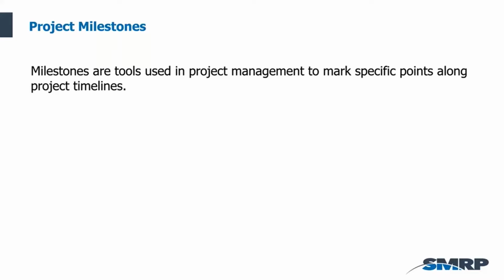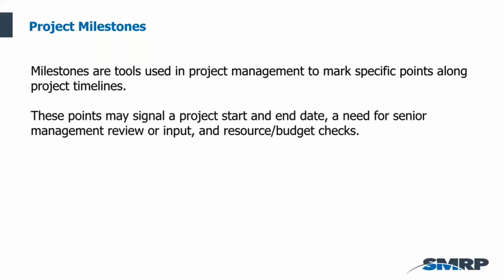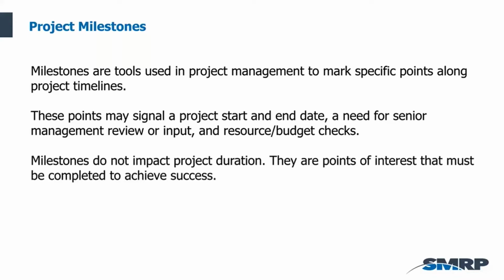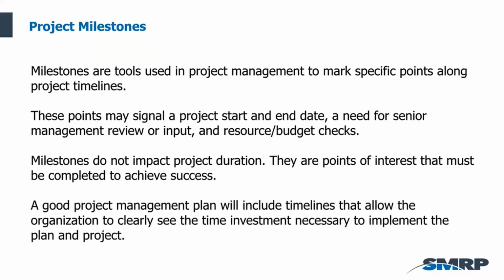Project milestones. So milestones are just tools that are used in project management to mark specific points along project timelines. These points may signal a project start and an end date, might signal a need for a senior management review or input of some stakeholder, or it could be when resource or budget checks have to be looked at to make sure that we're not exceeding our limits. Milestones don't impact the project duration. They're the points of interest that have to be completed to achieve success.